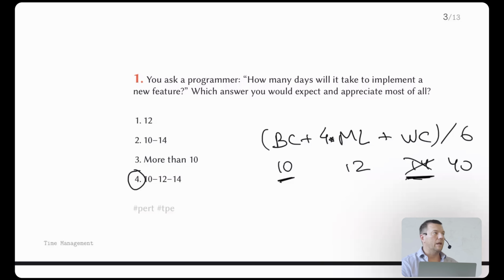And then I would say, okay, now it's reasonable. Now it's the worst case, so I can take this number and use it. And for the best case, I say, are you sure? The difference is so small between these two numbers, 10 and 12. It doesn't look real. You should think about whether in the best case, maybe you just opened this bug and it's fixed in just one line of code or a few lines of code. Maybe you get lucky. So the best case should be like 2 days. So from 2 to 12 to 40, this sounds reasonable to me.